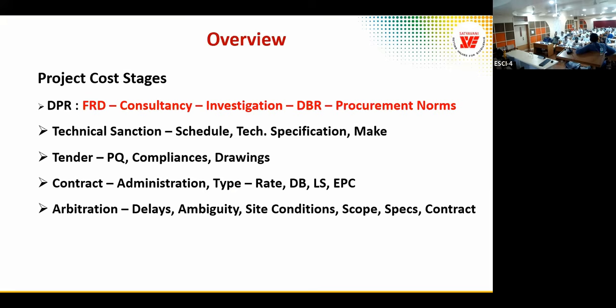They converted the hillock into aggregates and made a pyramid of aggregates on the site. Who will evacuate that? So these are all changes in site conditions and scope changes in the contract that we have to avoid. Specification change. That's why I mentioned in the technical sanction, specification has to be fixed, frozen, and then contract conditions